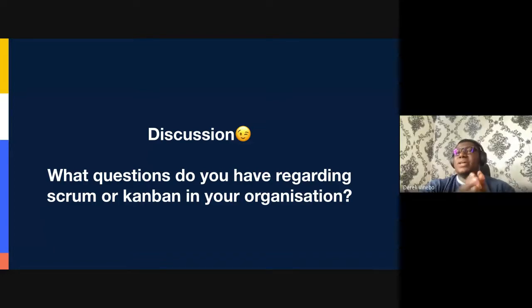Okay, so it depends on where you need to implement it, and which team you're using. So what product are you building? What is your team dynamics currently? And which do you think would actually help your team develop faster and give you value faster? Have experience in your team with both sprint and Kanban. Because I always feel like teams that are just starting out, very new, very young, but less distracted, should always start with Scrum, because Scrum gets them to focus on a set of tasks and commit to work for a period of time.